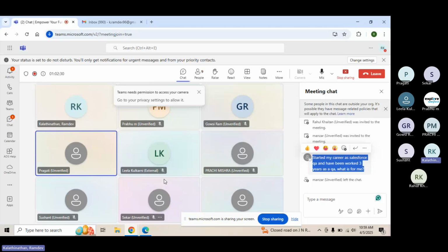Or when it comes to cost, something that you can also do is try and say, okay, if I have to implement all these 10 modules, it's going to cost you so much. Today I'll implement 7, the rest 3 I'll implement later. This is also something that you can try with your customer to see if you're able to convince them. There are different strategies, right? What I'm telling you is probably only one or two. If we talk about detailed scenarios, there can be many other options that we can deal with. I hope that makes sense to you.